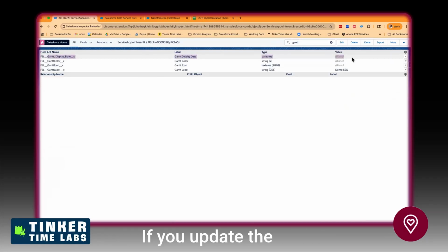If you update the Gantt display date to be today and do that for the relevant records that haven't been touched, you'll keep seeing them and go, well, why hasn't someone touched this? Why hasn't someone touched that? And either manually adjust the due date, as Leigh-Anne is saying, or spawn some new record so you do give attention to that work. So Bruce, do you have a trigger, or a scheduled trigger flow that runs to update those records? You can. So yeah, you can do a Gantt display date that's always today for those ones that didn't get processed in the past.